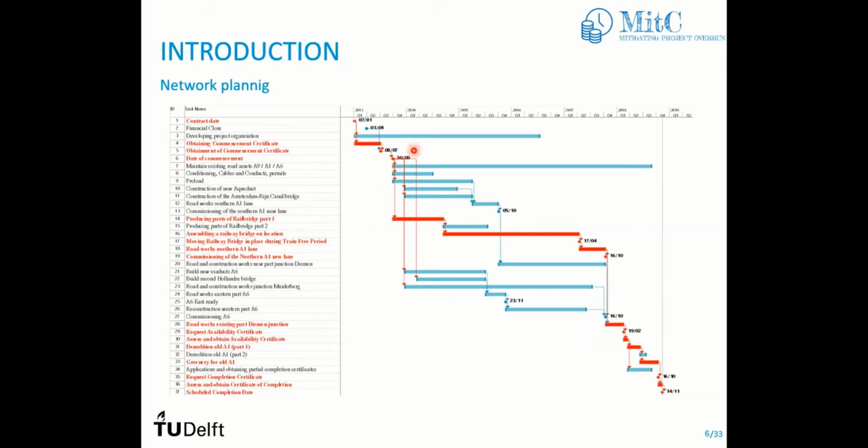However, all of that is based on something called a deterministic approach. Deterministic approach means that every activity has a specific, deterministic duration. We know when it starts, we know when it ends, and the difference between the starting point and ending point is the duration of the activity. But usually the duration is not constant. Sometimes it takes longer than expected, sometimes shorter, so you're not really sure whether your activity is going to be on time.